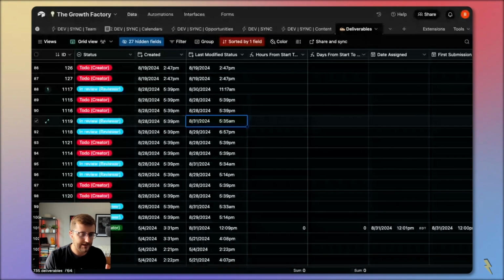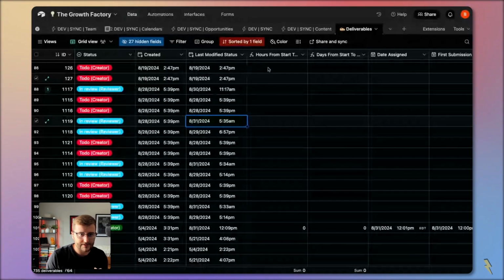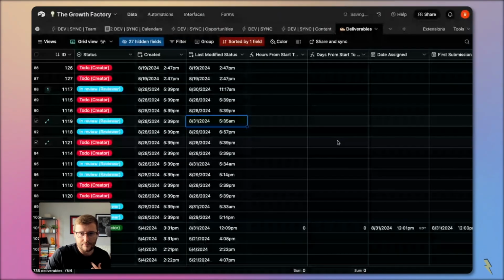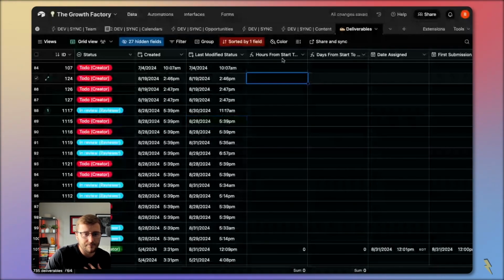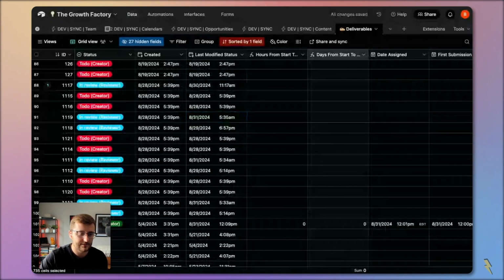You're going to have really good data once you have significant change in your statuses and all of these automations are on, timestamping each date field. It's going to work really well. So that's how I work with date fields and statuses. You timestamp things and then you build formulas. And as you can see with these little averages in the interfaces, you can build all of your dashboards around these numeric fields to count the number of hours or days between statuses.